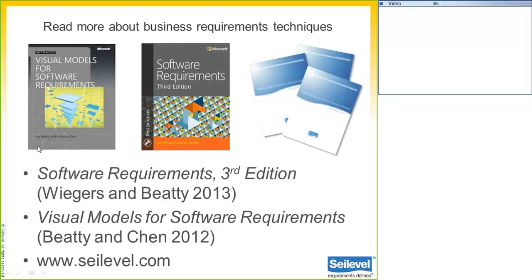So it was pretty easy to go through each feature and determine which of these features are going to contribute to the most revenue, by which customers are more likely to buy, and how much more we are likely to sell by implementing this particular feature. So that's another exercise you can do in an agile environment, if you have a good understanding of what your customer needs are.